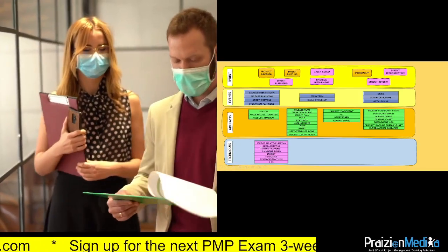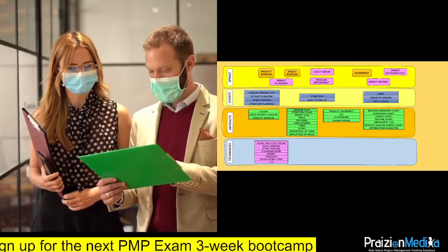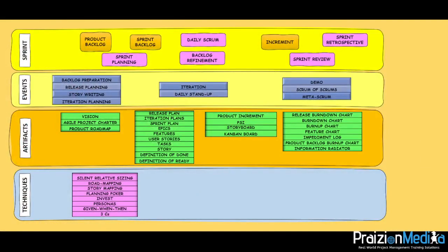Moving on, we have the concept of road mapping, which we've talked about a little bit. We have the concept of story mapping, and this is a different technique that is used in the world of Agile. Story mapping can be best described as a visual practice for organizing work into a useful model to help understand the sets of high-value features to be created over time. This is where we could identify omissions in the backlog and effectively plan releases that deliver value to users.